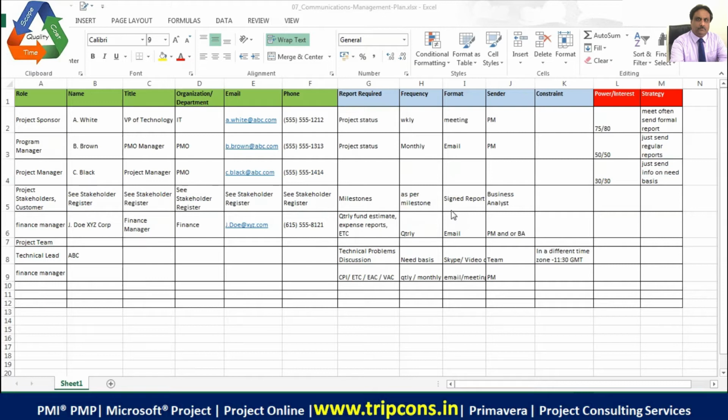You should also make sure that you can add additional columns, and you can map it and convert this into the traceability matrix. What you can do is put the major sections of the requirements. You can create a category that is the client side, keep the same columns, and just mark a list as client side. Under that you also have another column, so you can mark the requirement traceability there, and this list would serve you very handy, and you would never miss an important stakeholder, and you would also be able to analyze them.